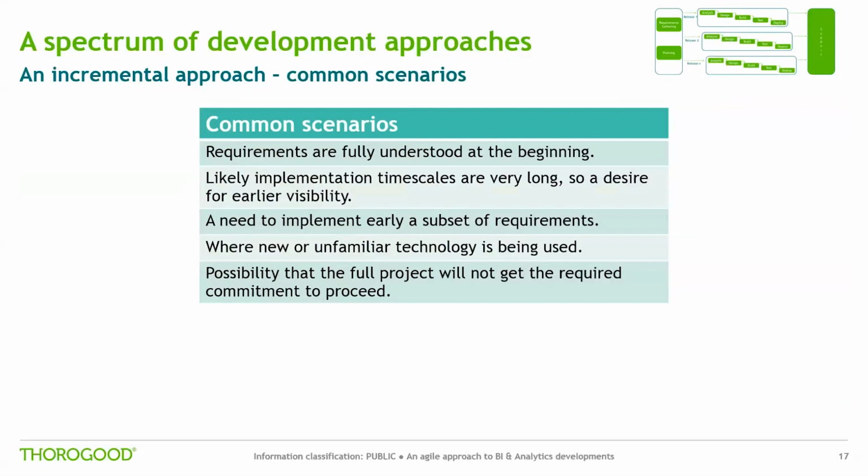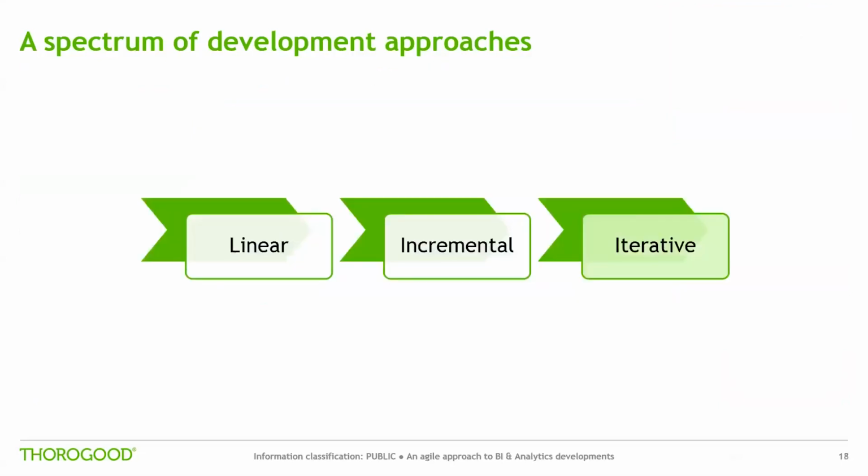Where new or unfamiliar technology is being used, establishing a better understanding of the possibilities of the technology through smaller and quicker releases may lead to better thought-through additional increments. And where there is a possibility that the full project will not get the required commitment to proceed, decisions for additional functionality can be deferred based on the success of earlier phases and the nature of the operating environment.